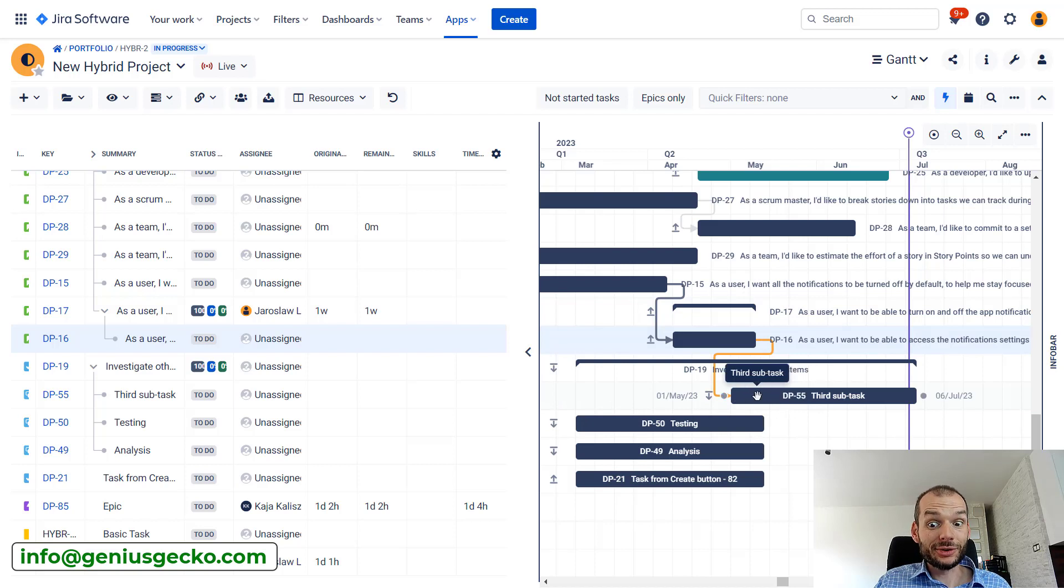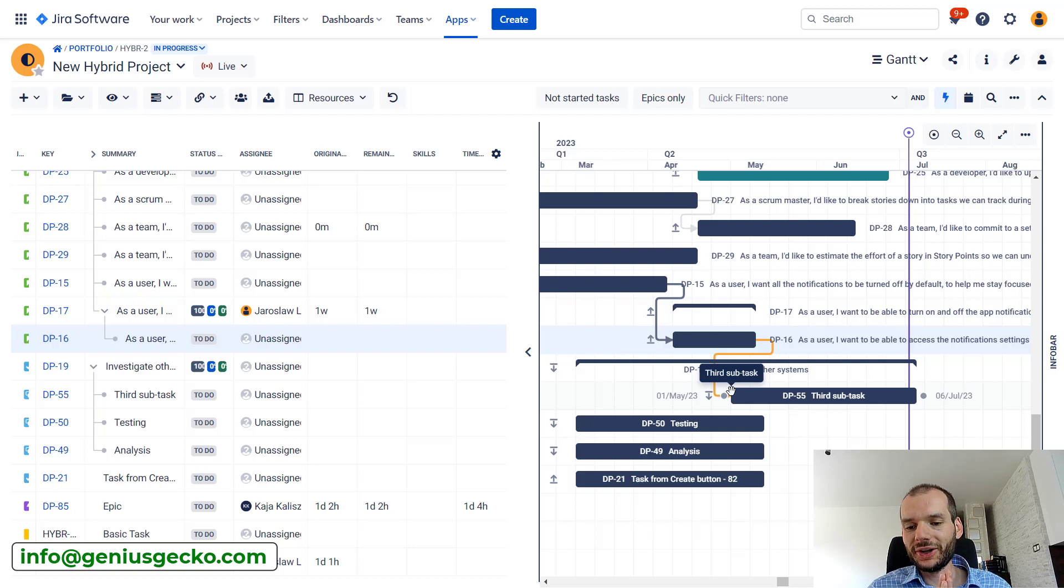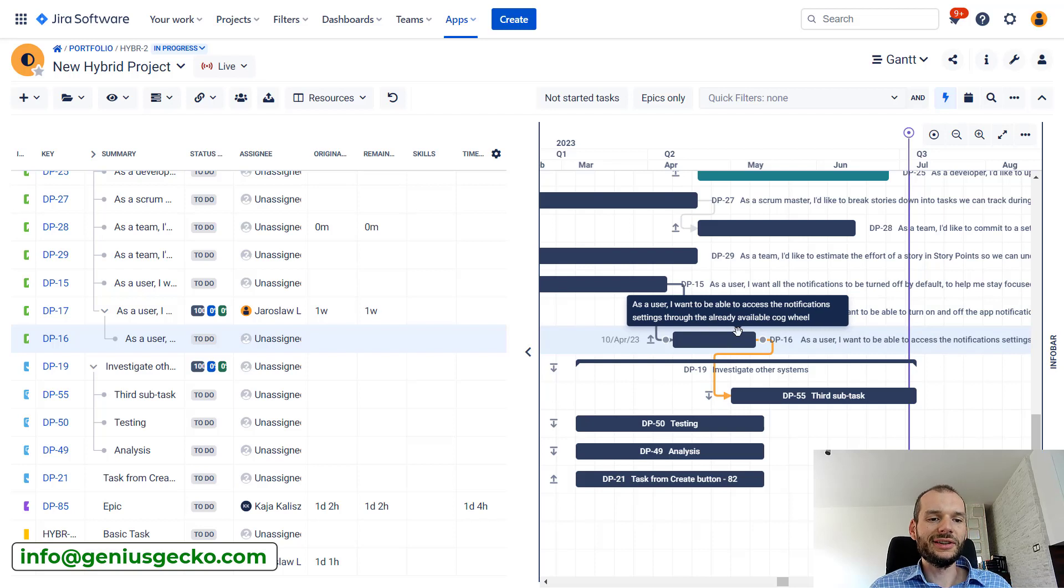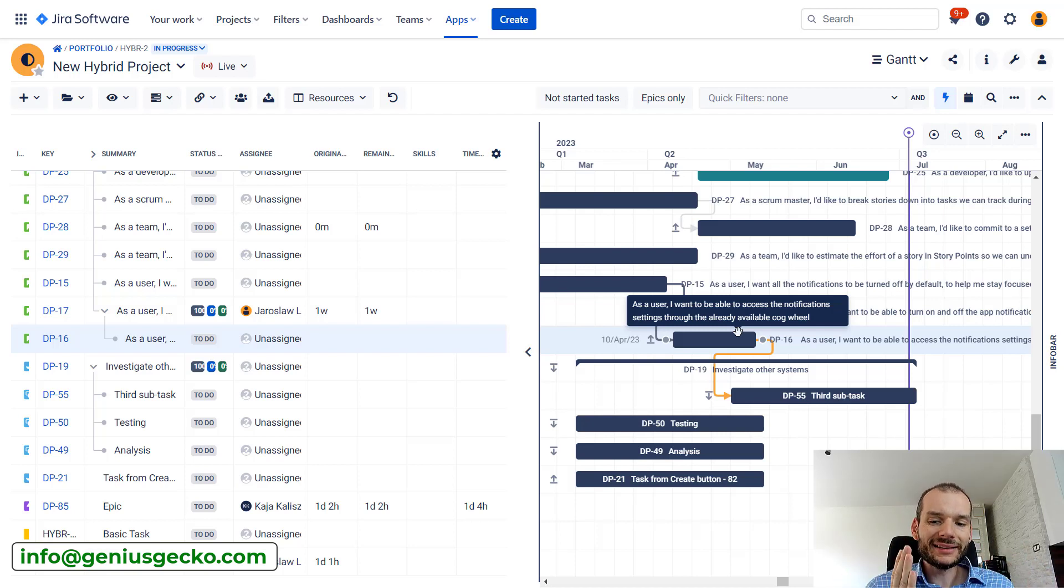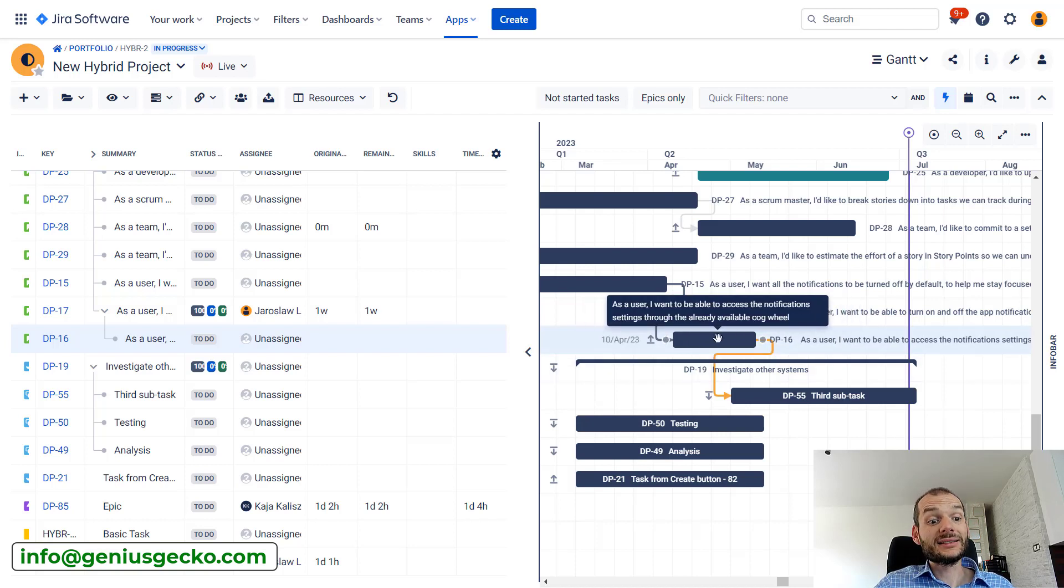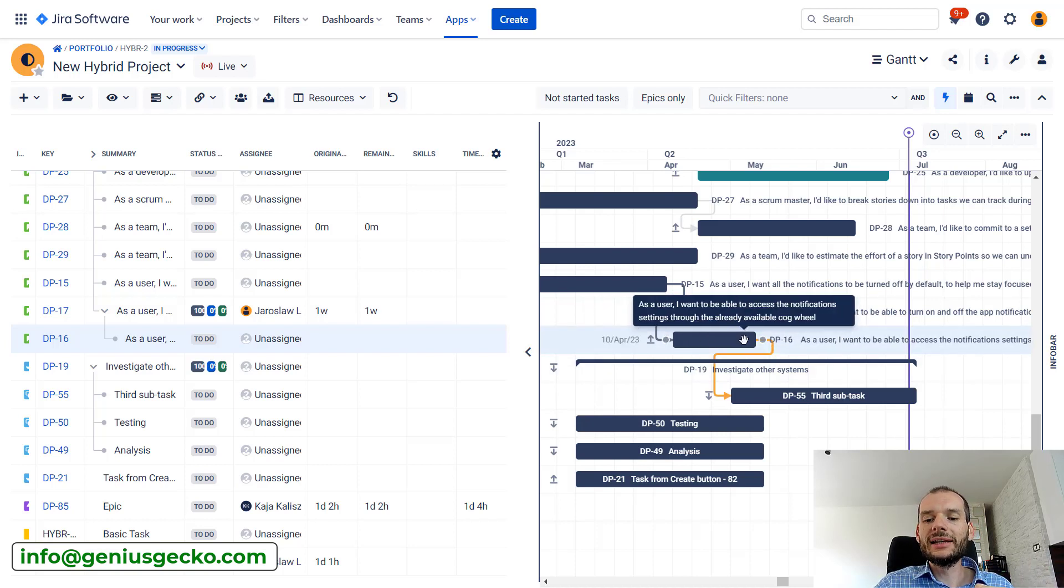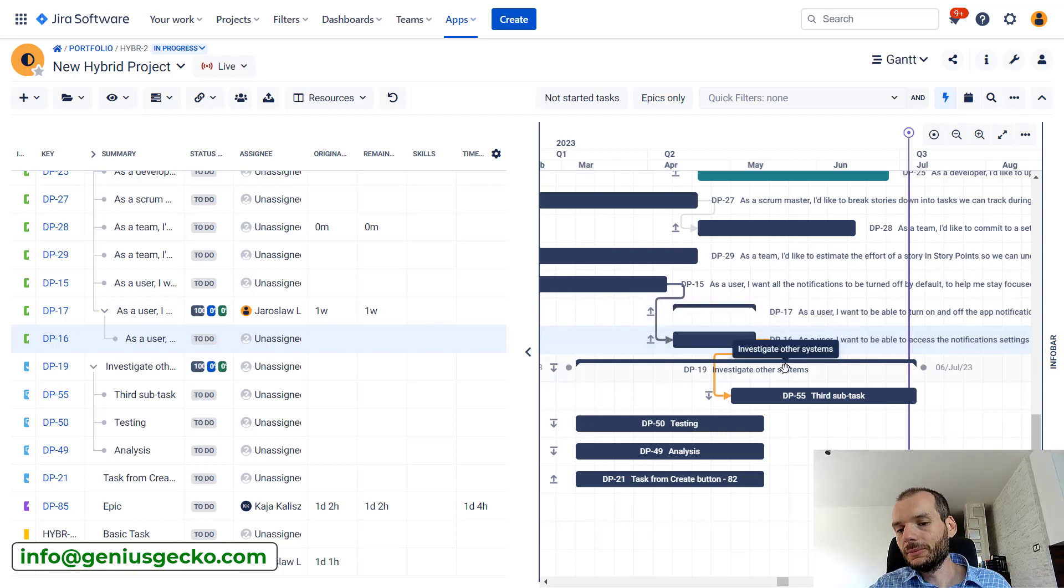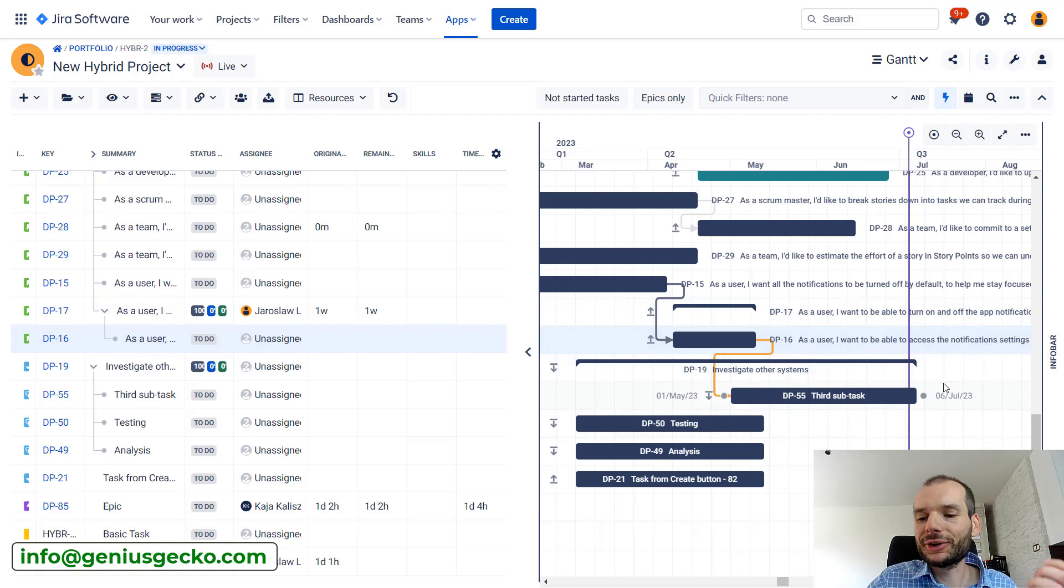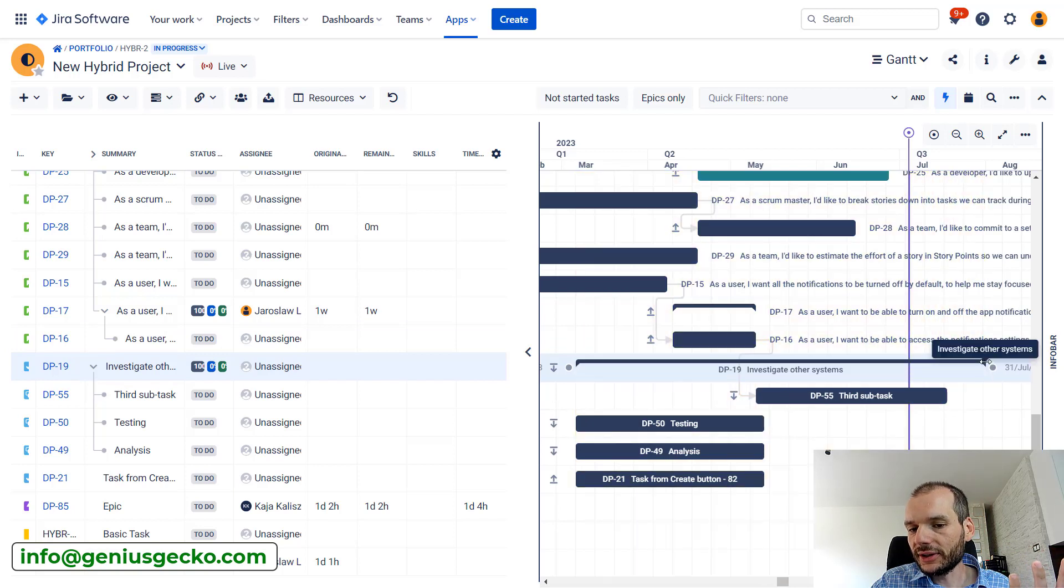If we have auto top down, we should create this dependency to the parent, not to the child's task. Now we have dependency to the child, and we need to do something about this, because otherwise the person responsible for this task will try to start working it when the start date is located, and it will turn out that they cannot because this task was not finished - they do not have all the input and they are basically blocked. So if that happens, we need to look at what was the reason for that, and maybe access this task, see the history why it was updated, and act accordingly. Maybe we need to update this plan. In this case it would be sufficient to expand the parent.